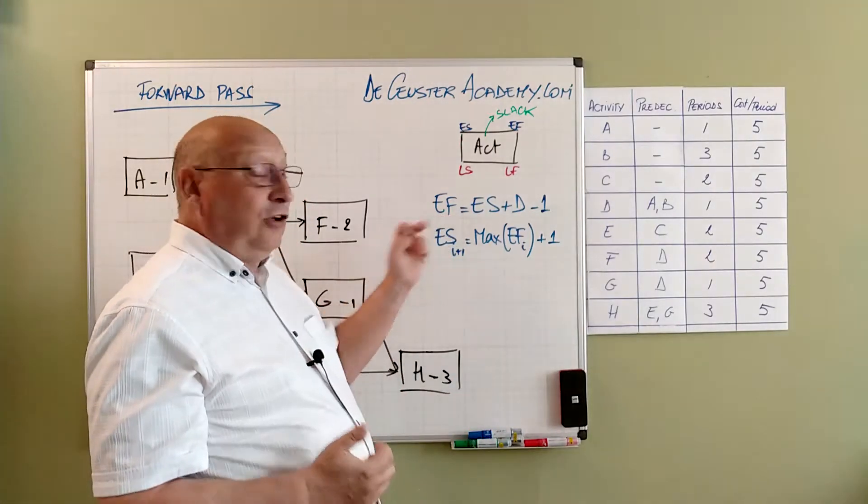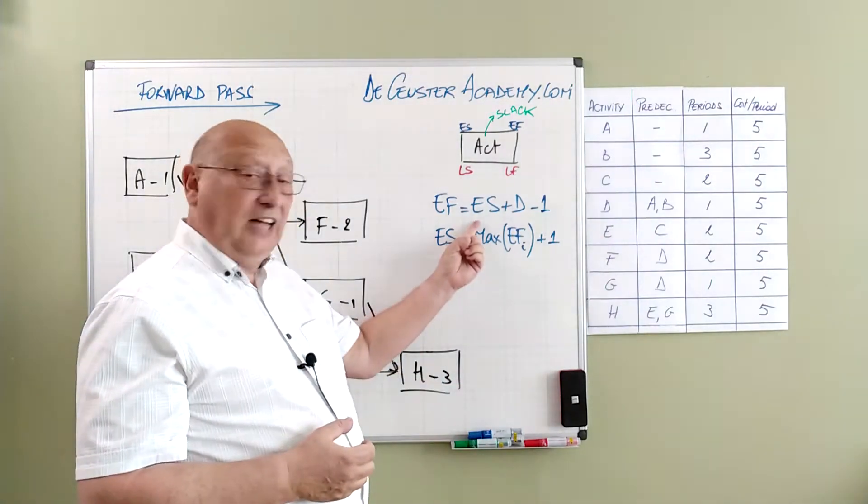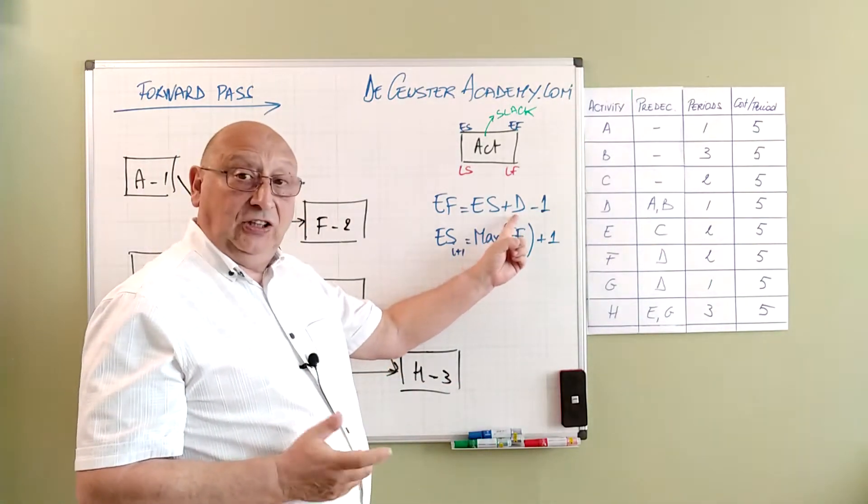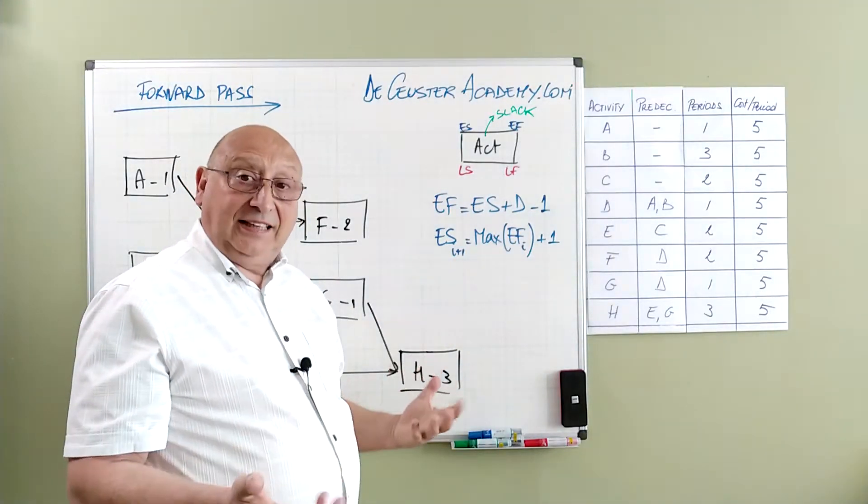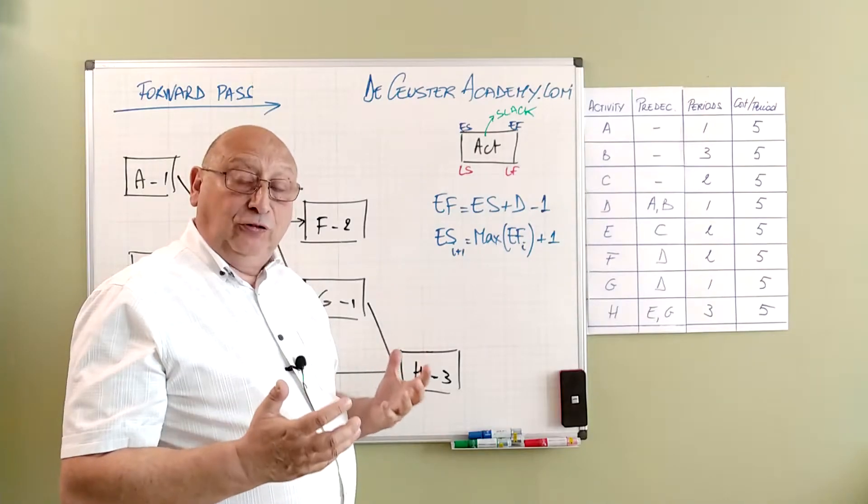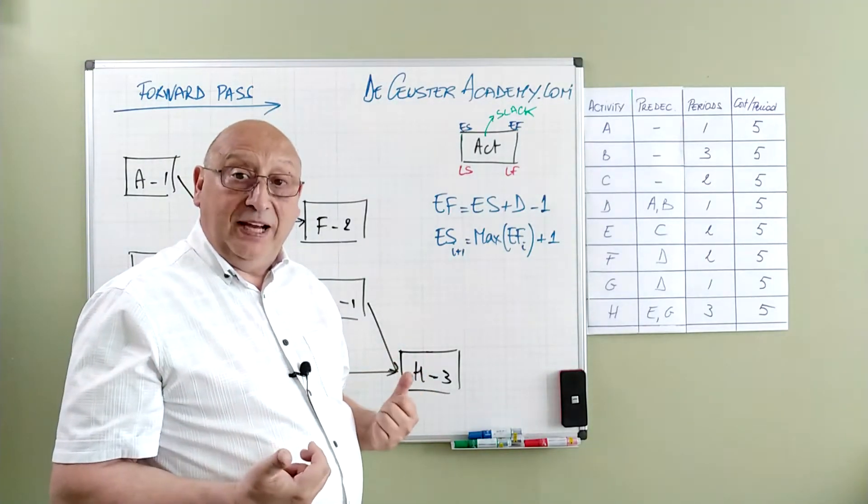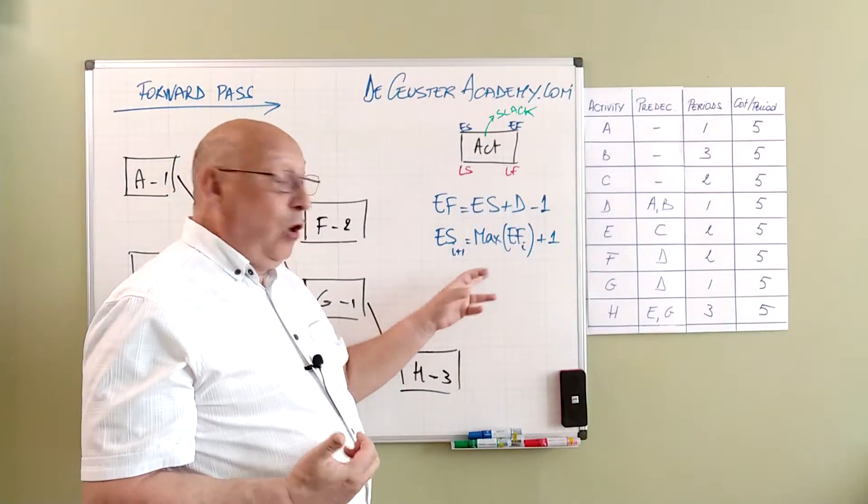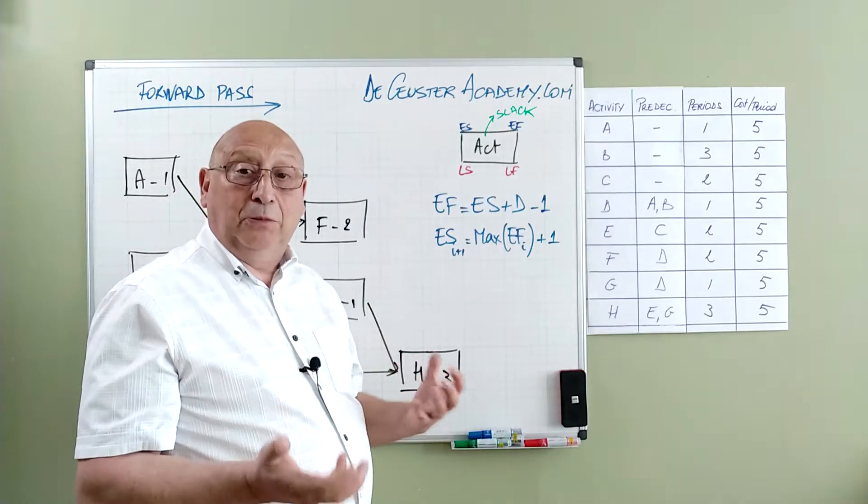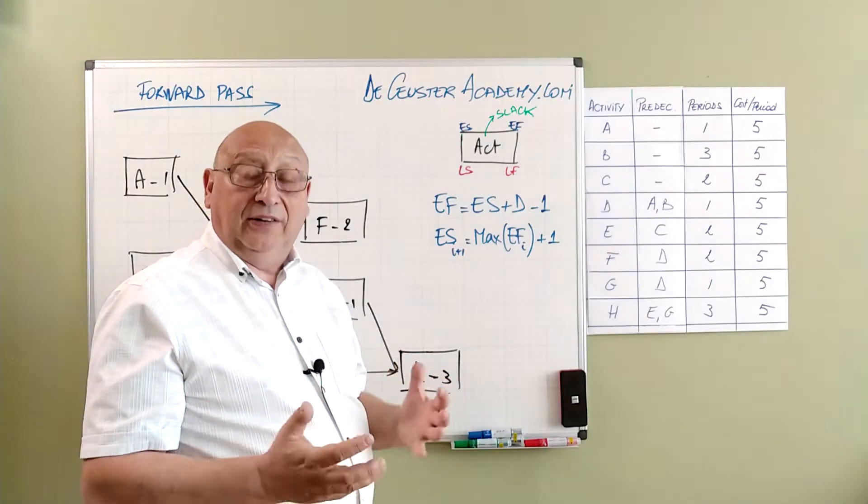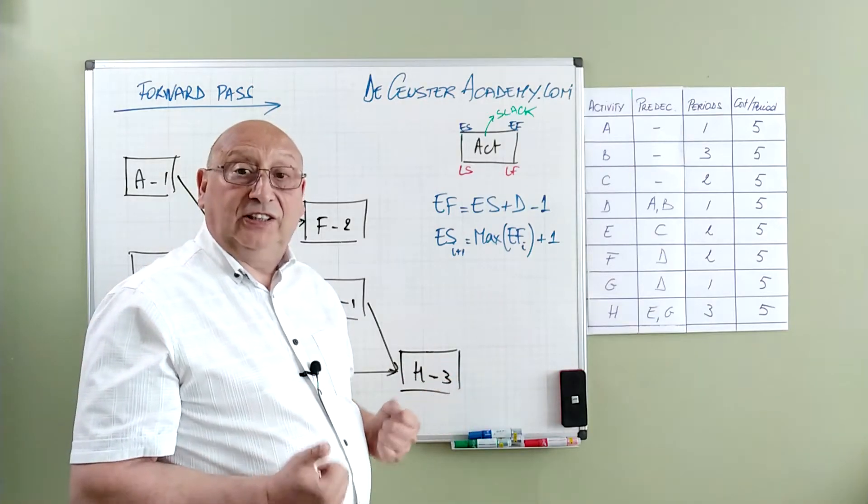To calculate the early finish of an activity, we start from the early start, add the duration and subtract one. For the next activity we have to find the early start based on the predecessor information. So we look at all the early finish of the predecessors and we take the maximum value and add one. That will be the early start for the successor activity.